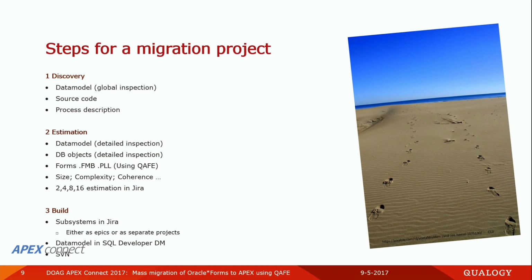We found at migration that there's a lot of similarity with normal projects, but there are 3 phases. First is the discovery phase. That is the phase where you end up with a customer lead for some reason, and you can discuss with the CTO, with the lead users about what they want and what they need. Most of the time you have about 4 hours, that is 1 hour discussion with the customer. Then the director or the technical guy leaves and you are stuck with the DBA and the end user.